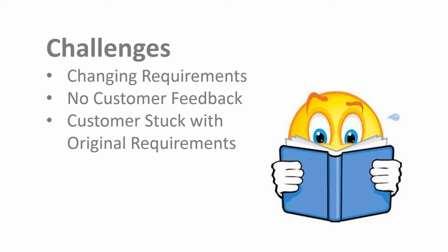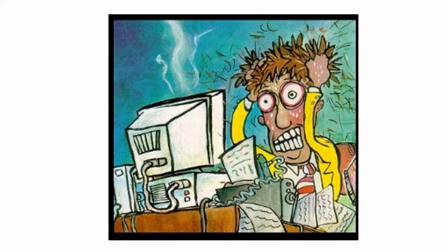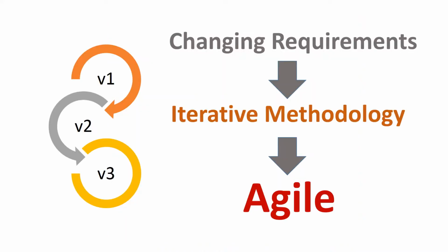In addition, the customer is not able to view the progress of the software development or provide feedback. The customer is stuck with the original requirements which might not be of any business value anymore. The software delivered using waterfall method is sometimes simply out of date. Since the customer and features requested by the customer is the biggest driving force in development of the software, missing this mark means disaster. Hence, instead of using the waterfall method, iterative methodology was introduced to accommodate rapidly changing requirements,